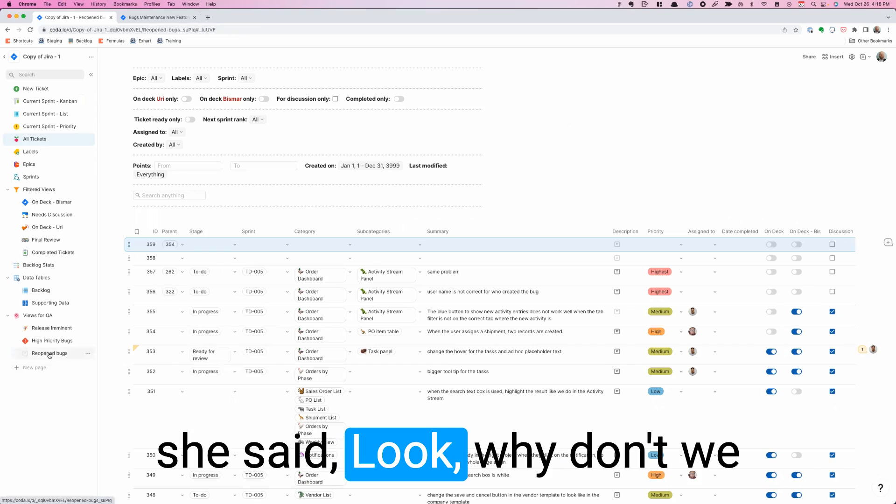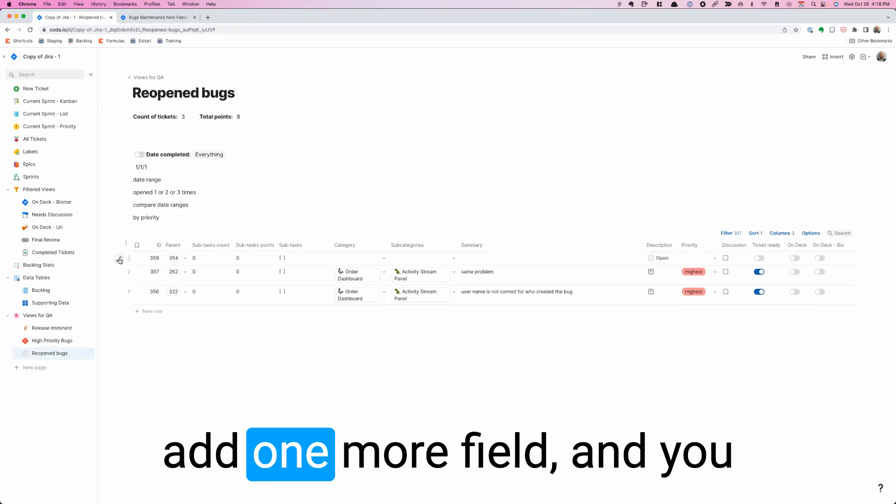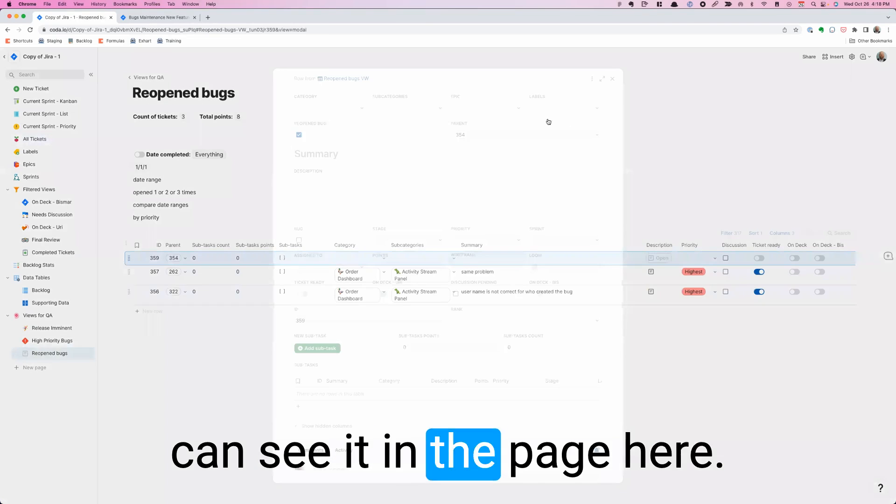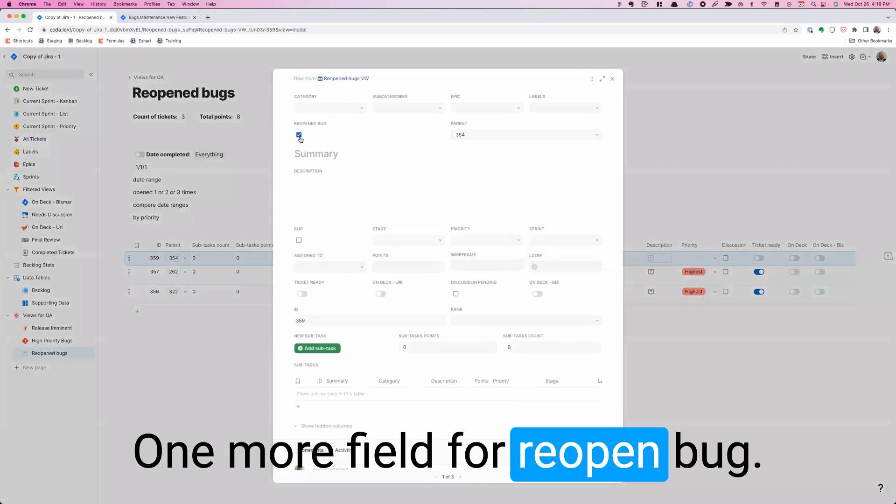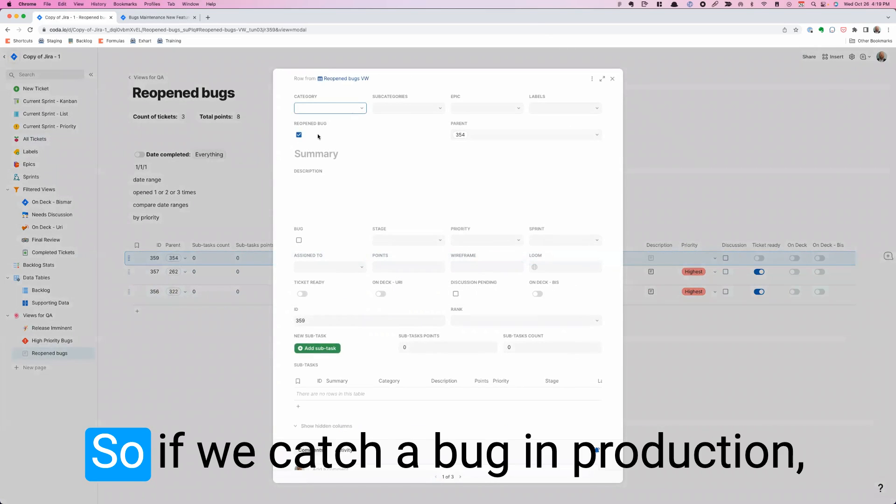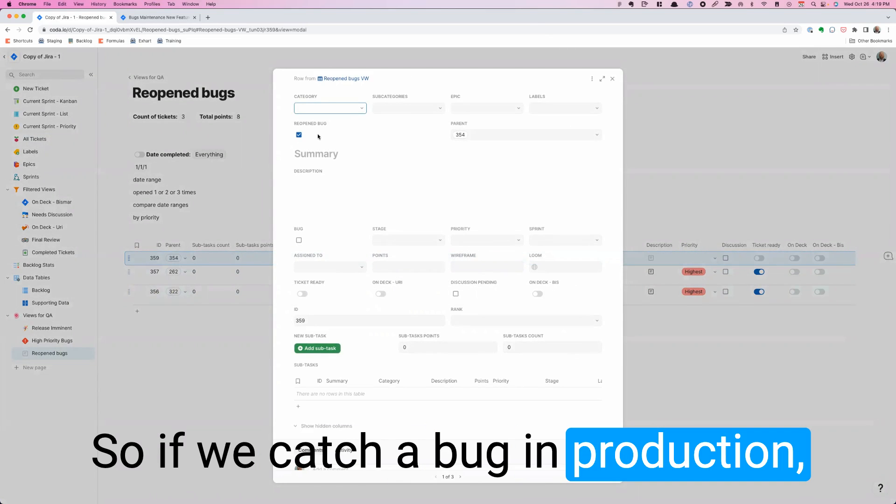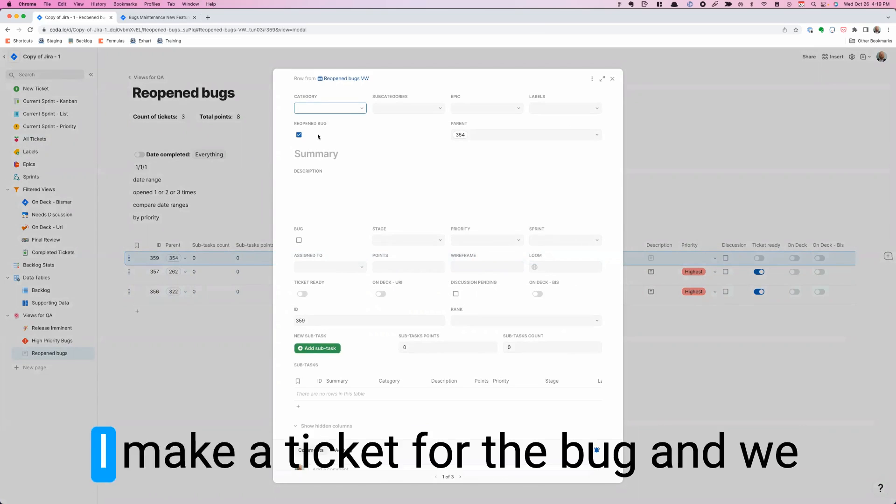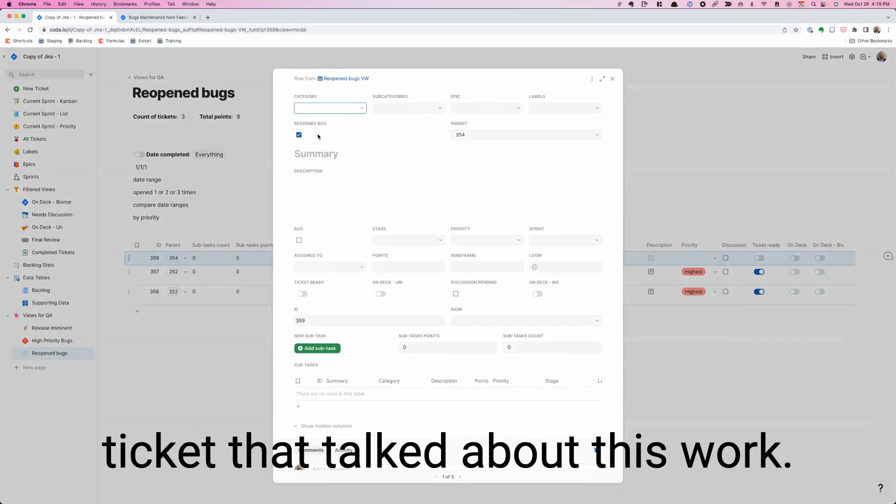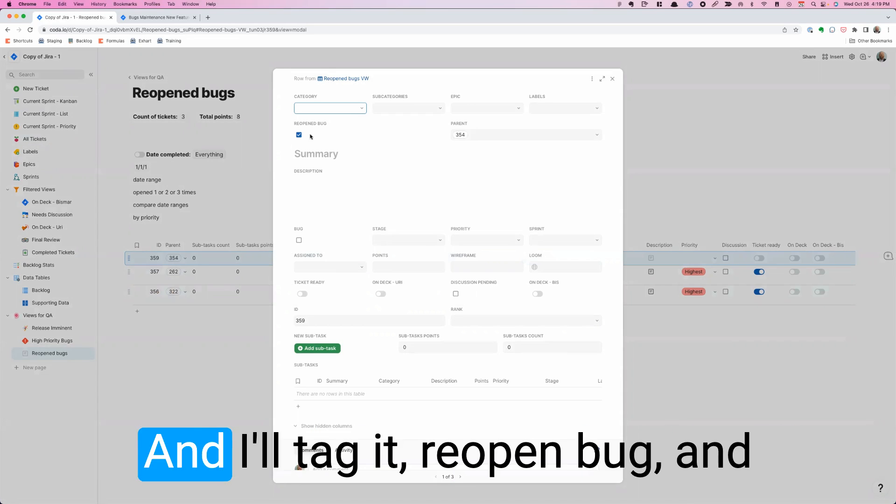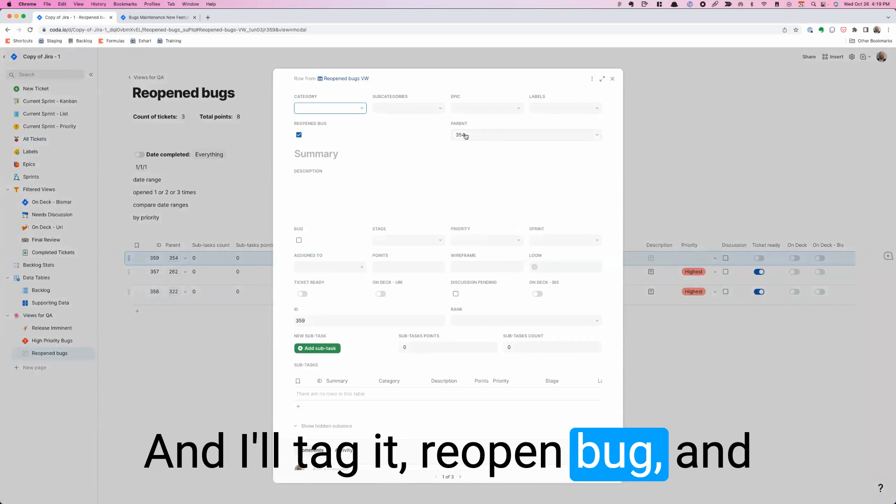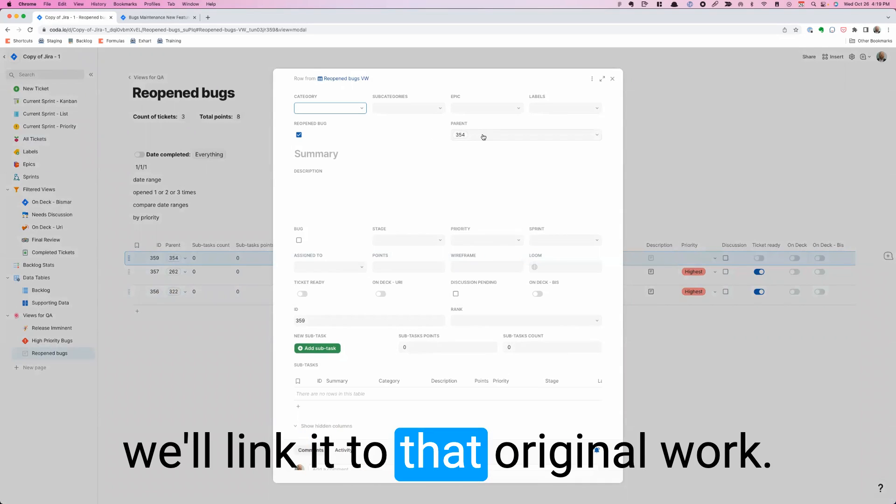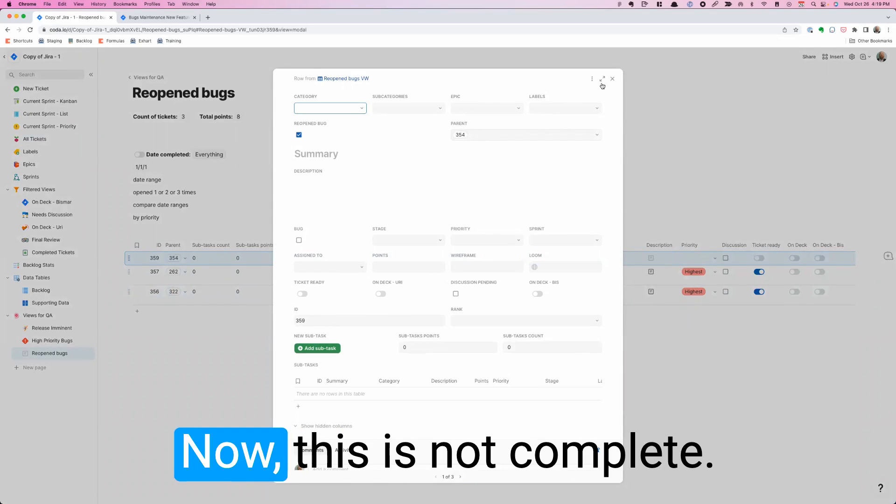So once QA saw that, she said, why don't we add one more field? And you can see it in the page here. One more field for reopen bug. So if we catch a bug in production, I make a ticket for the bug. And we talk about, what was the original ticket that talked about this work? And I'll tag it reopen bug and we'll link it to that original work.